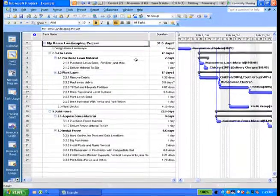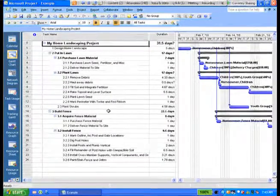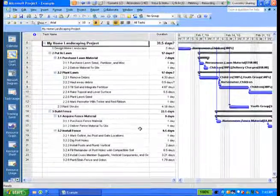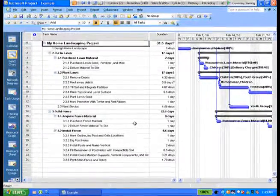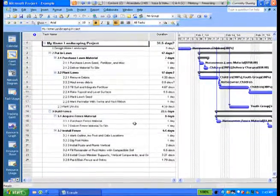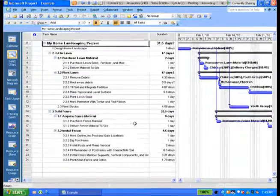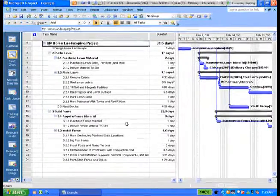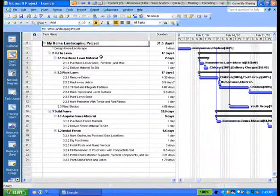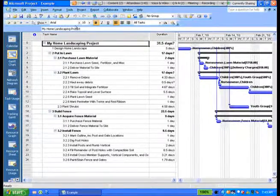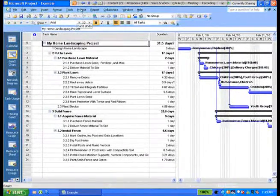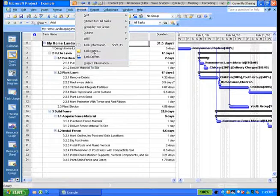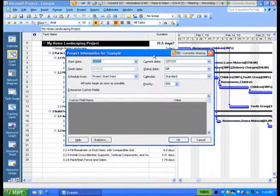Now, setting a project start date. This information is all well and fine, but quite often we have to actually set a project start date later, after the data is in or after the initial data is in. And the location for that is in the project information. You get there by selecting project, project information.